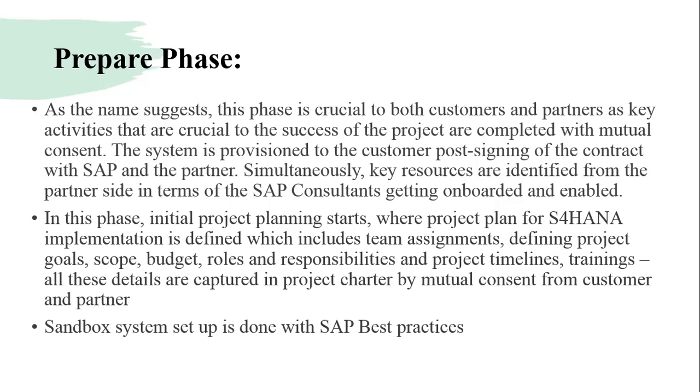the project plan for SAP S4HANA implementation is defined, which includes team assignments, defining project goals, the scope of the project, the budget, the roles, the responsibilities, the project timelines, trainings, and all these details are captured in the project charter for mutual consent for customers and partners. So we have a project charter, which is like a document that captures all the necessary initial phase of the project planning. The sandbox system is also done with SAP best practices.